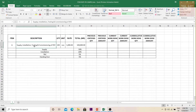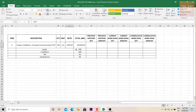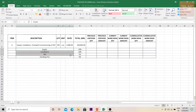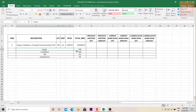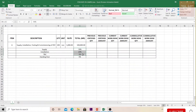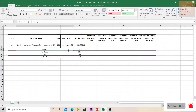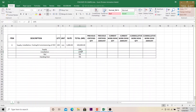I have prepared a small table to explain this concept. Here I've taken just one item. The description is 'supply, installation, testing and commissioning of XYZ.' The BOQ quantity is 100 numbers and the rate is 1,000, so the total amount is 100,000. The rate breakup percentages are: 70% for supply, 20% for installation, 5% for testing and commissioning, and 5% for handing over — totalling 100%.